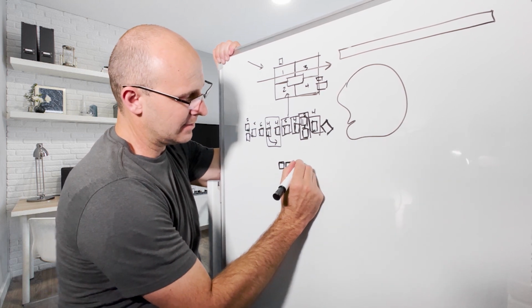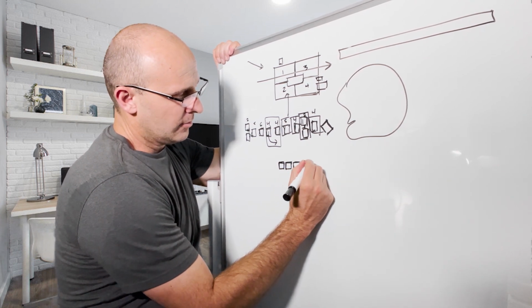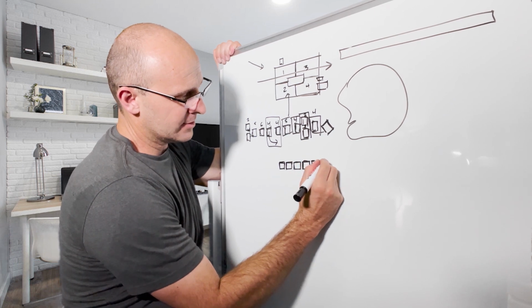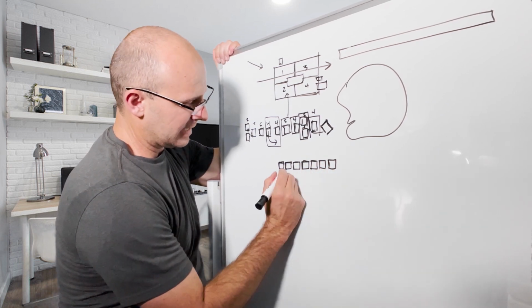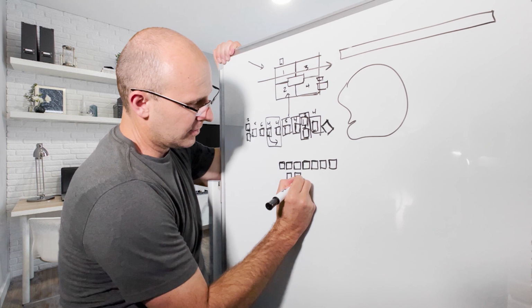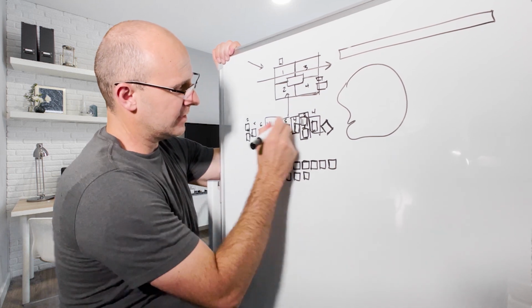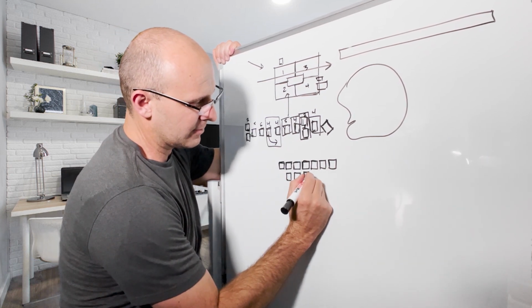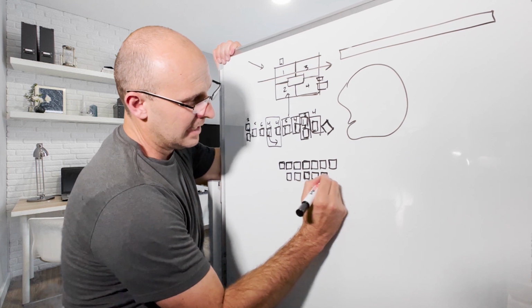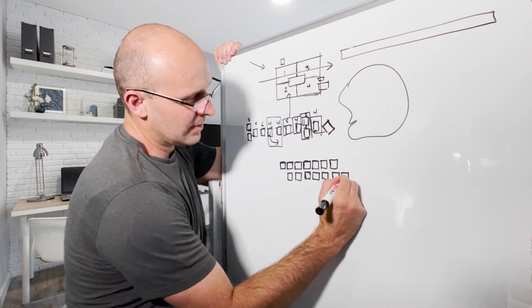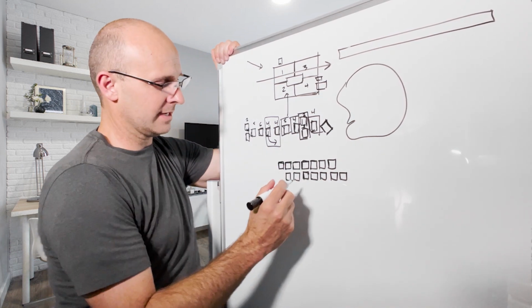So, and I'm just saying that when you're running a Takt plan, you'll put it on a rhythm, and let's just say, hey, these pretty much balanced out to where they were at a 5-day Takt time, and then these Takt wagons, what they have is they have work packages, right?